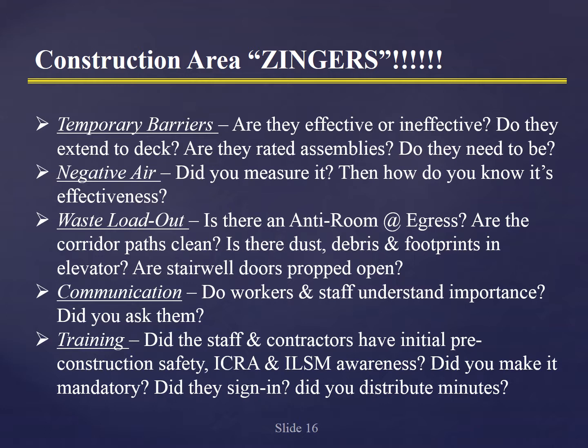It would be interesting if you made it a practice that when a new contractor or sub comes on site, you just naturally go out there and ask them 2 or 3 questions related to infection prevention, and then you report that data back to the contractor and say, hey, listen, you're doing a great job. You had 5 different subcontractors. I talked to them, and they all knew all 3 answers. Or for that matter, listen, I talked to 5 subcontractors, and no one had a clue what I was talking about. So you can see where that could help you improve processes and really help develop your contractor group as being the A team that you want in your building versus the C, D, or E team that you're concerned about what they might do next.